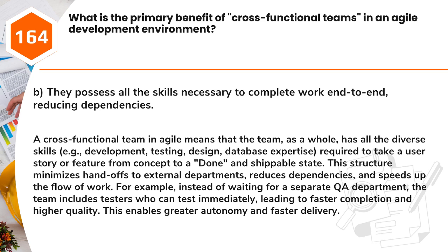This structure minimizes handoffs to external departments, reduces dependencies, and speeds up the flow of work. For example, instead of waiting for a separate QA department, the team includes testers who can test immediately, leading to faster completion and higher quality. This enables greater autonomy and faster delivery.